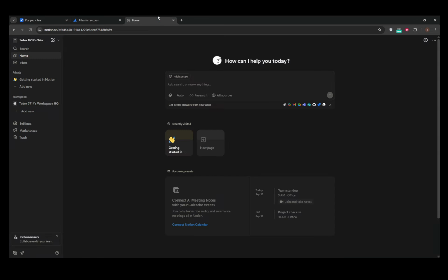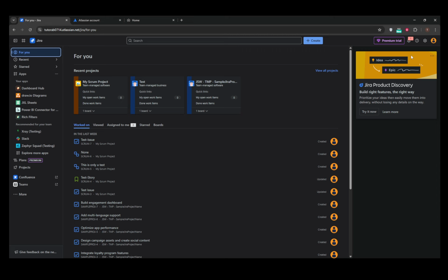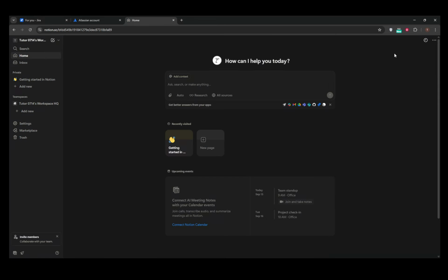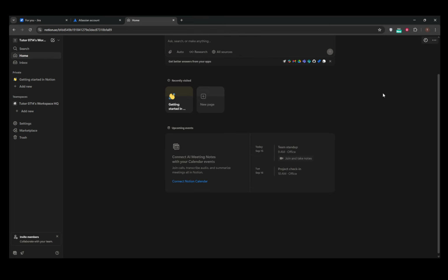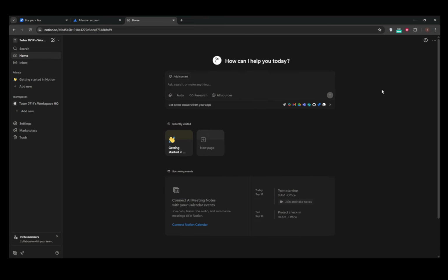First things first, let's check your role since this step determines what you can do. To utilize Notion's built-in Jira sync, you need to be a workspace owner within Notion and hold admin rights in Jira. For more basic functions like link previews or the legacy sync, fewer permissions are required. It's crucial to have these roles sorted out before proceeding to ensure a smooth setup process.